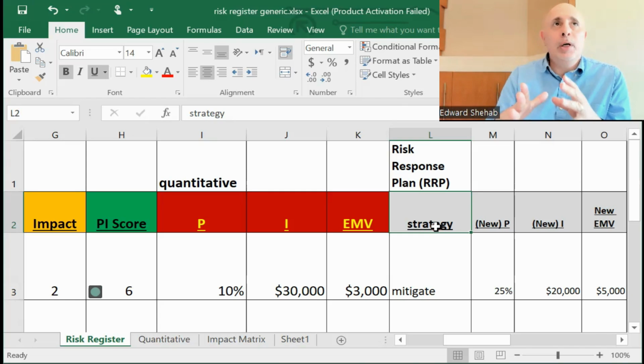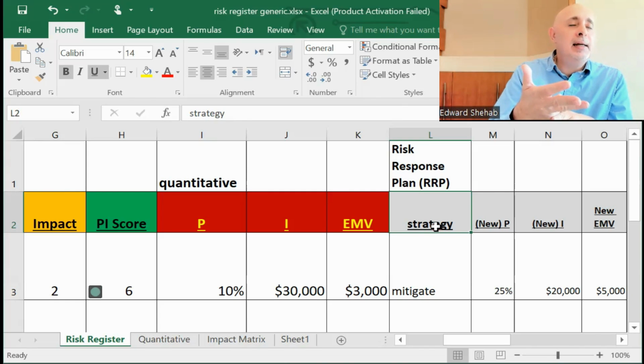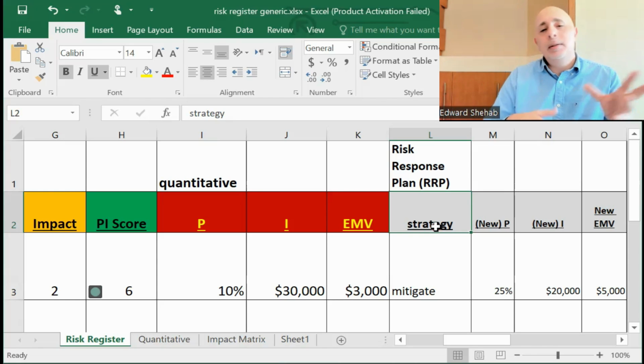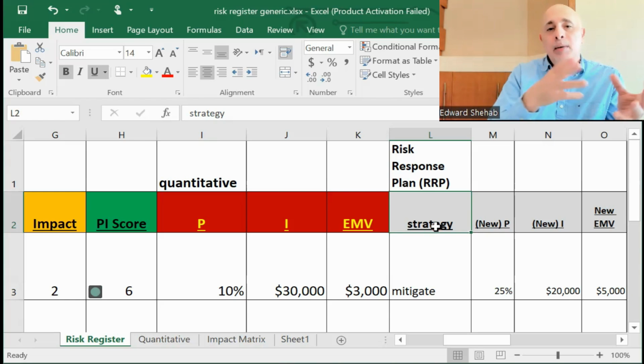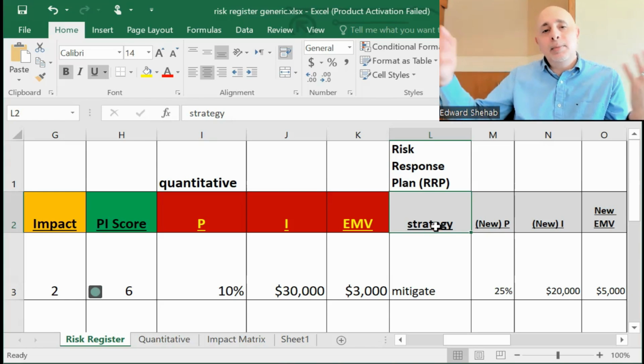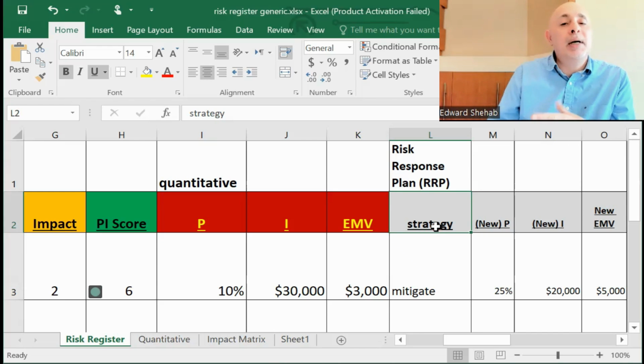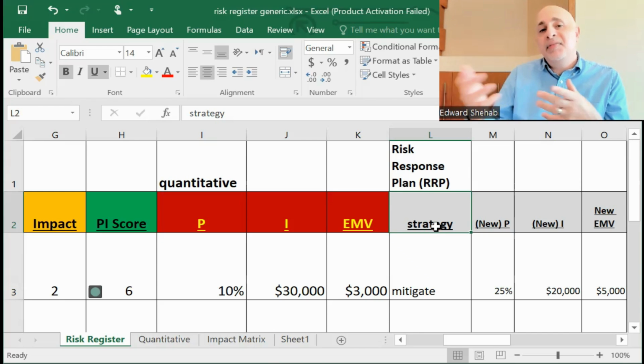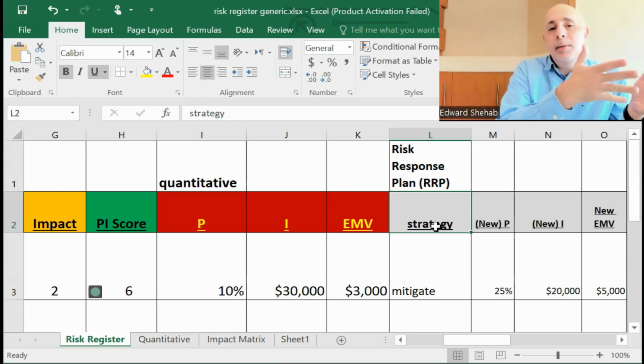If you cannot avoid the risk, let's say we're trying to ship something and we wanted to ship it by sea initially, and we said, no, this could be hijacked or I don't know what. Let's move it to shipping by land. If we were able to ship by land, then the problem would have been avoided. But let's say the item is too bulky and it's not recommended to ship by land because it'll just break or doesn't fit on a container, fits only by sea. So then we're stuck to doing it by sea.